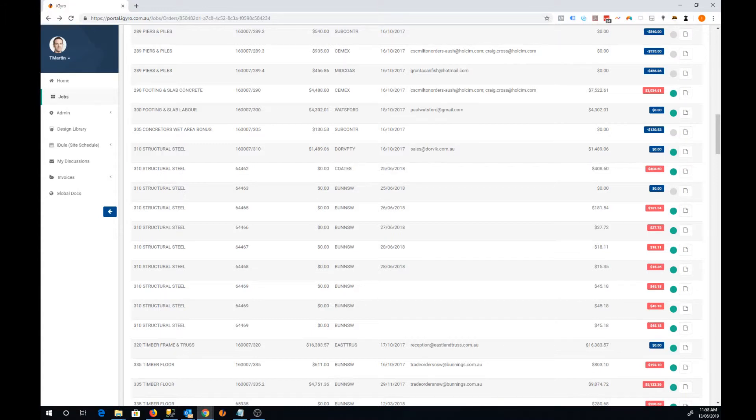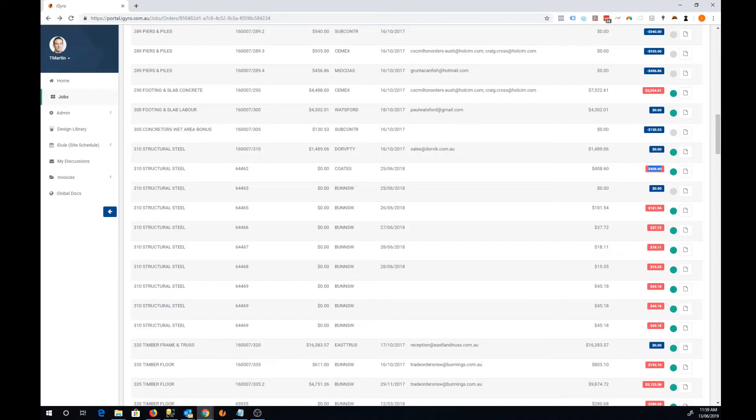We've received $408 worth of invoices. It's showing as an over amount, red indicator there just because the actual order was keyed in with $0 amount here.